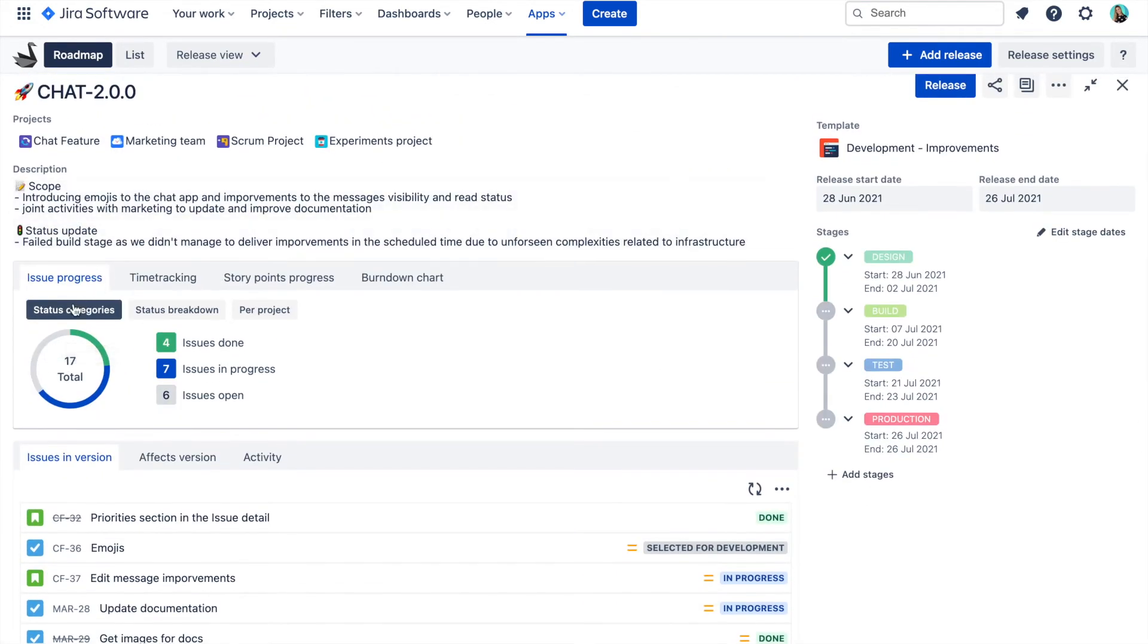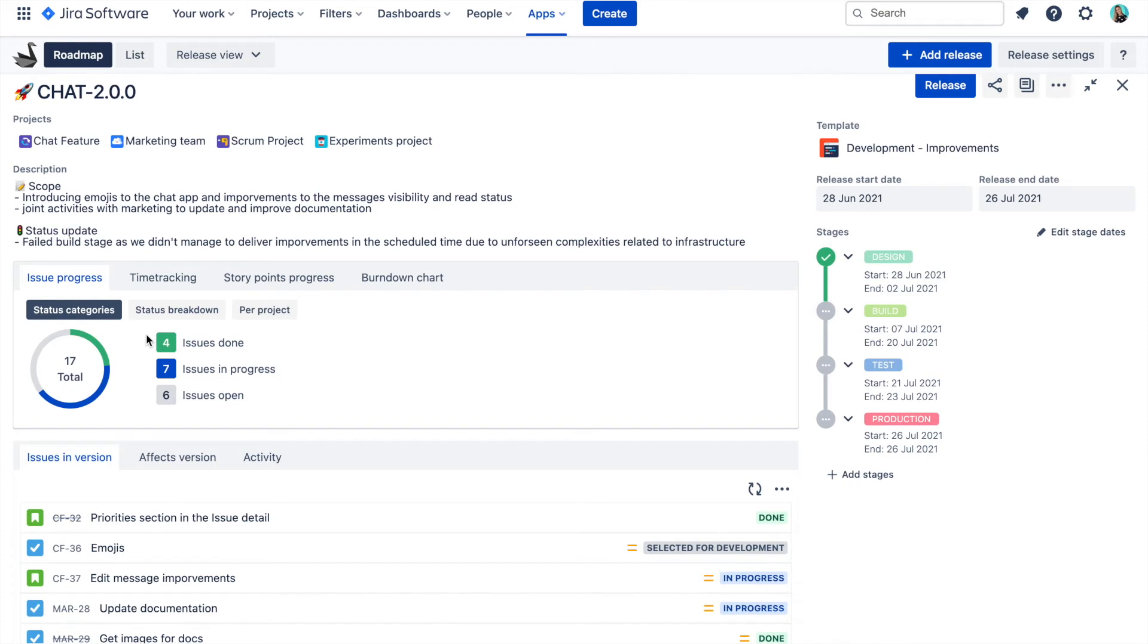These reports are split into four main categories: issue progress, time tracking, story points and burndown chart. In the issue progress section, you can see the status categories progress of issues from all projects linked to this release.